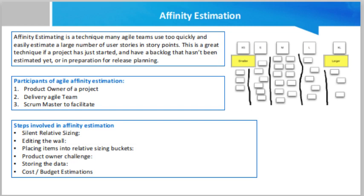The steps involved in affinity estimation start with silent relative sizing. The product owner provides the user stories to the team, and the agile team silently establishes the relative sizes of the user stories. The team arranges these stories in ascending order on a horizontal scale, rearranging notes or index cards until the entire team is satisfied. This step is performed silently to keep the process quick and non-confrontational.